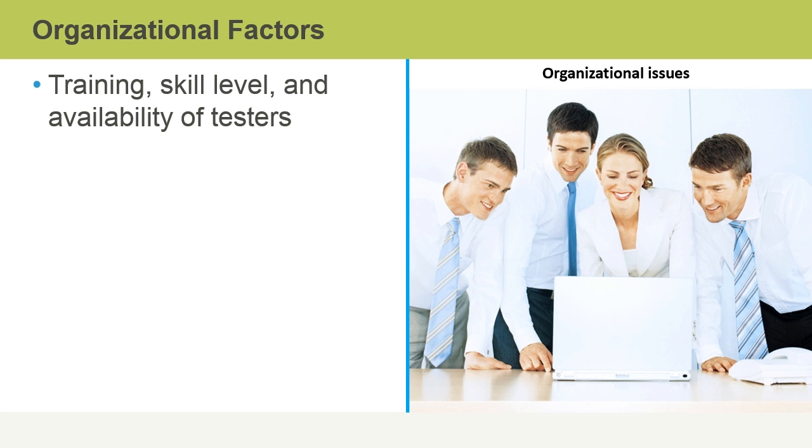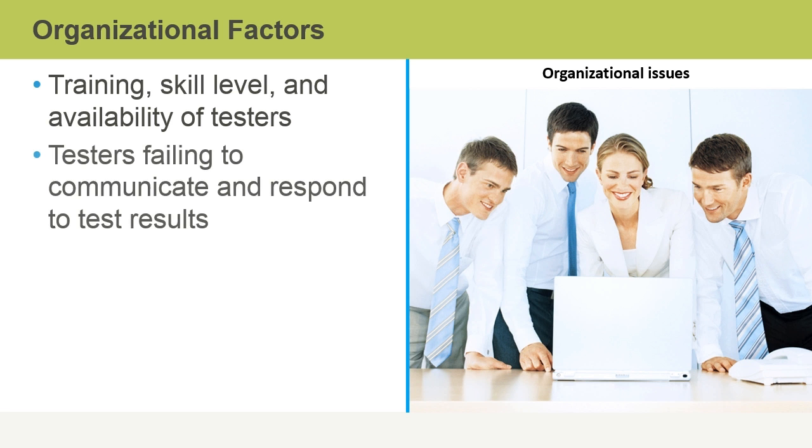Some of the common organizational factors contributing to risk include the training, skill level, and availability of testers. Inadequately trained testers with low skill levels or lack of committed availability presents a huge risk to the test project's success. Testers failing to communicate and respond to test results create delays in fixing defects, which ultimately affects the entire schedule.